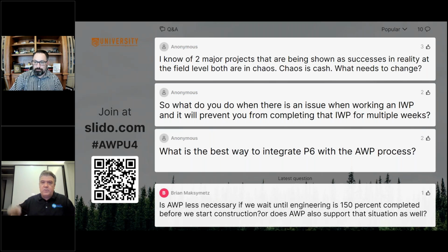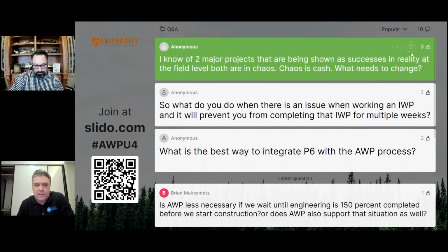But it really goes down to the heart of why we're doing this, because you don't build a plan and say, I'm exactly doing it this way. You're iteratively replanning on a weekly basis and getting my planning out front, so that the reliability of my plan goes up. And by finding out I can't do something 8 weeks from now, then I can start making work requests to say, get that material ready, get those drawings ready for 8 weeks from now. So I'm not waiting till I'm 2 weeks out, suddenly realizing I don't have what I need.